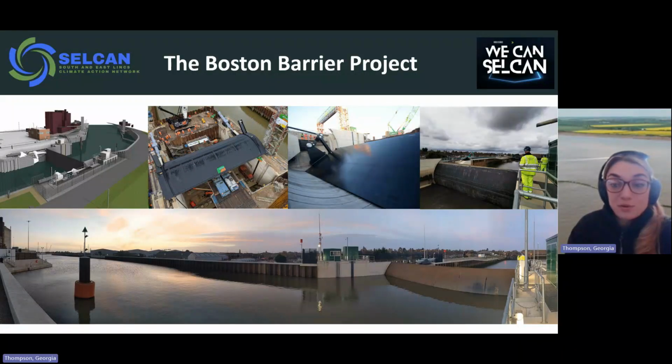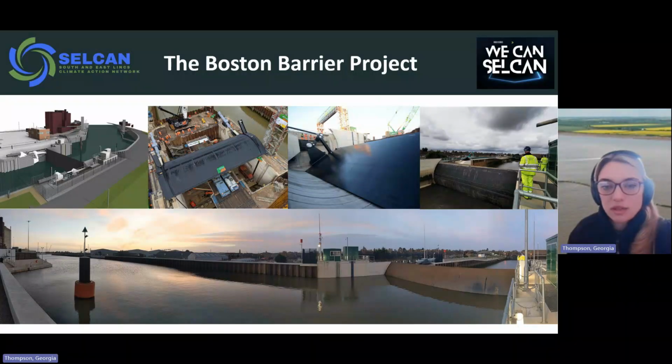The scheme also involved the construction of 1 kilometre of hard flood defence walls with a 100-year design life, taking into account forecast climate change, incorporating a public footpath, the Macmillan Way, which we've improved quite significantly with wildflower seed mixes, artwork, and improved walkways. And we know that the local community have been very patient with us during this first phase. There was a lot of piling needed for the flood walls, which involved hammering up to 18-metre long steel sheets to reinforce the embankments on either side of the barrier for over a kilometre.